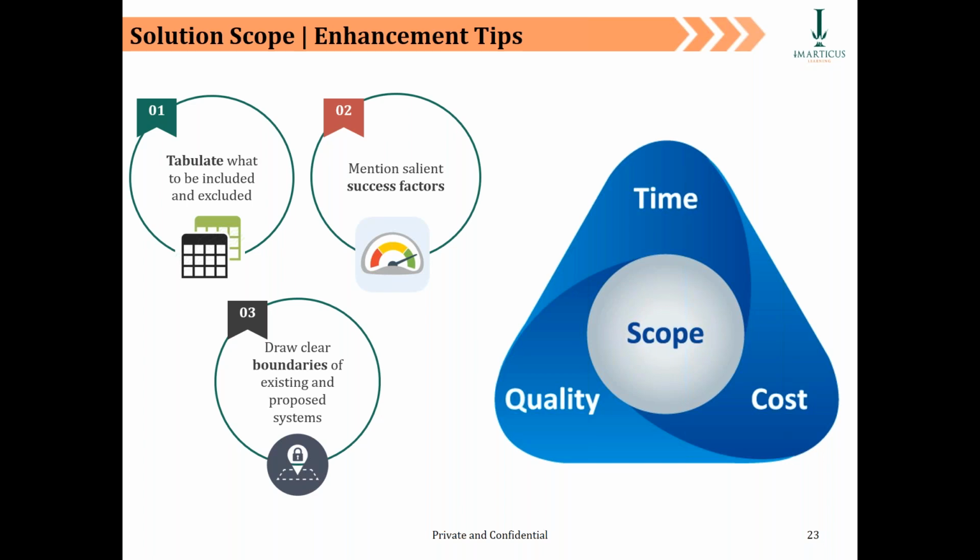Only three people do: X, Y, and Z. This means, guys, we will automate workflows for now, as a pilot, only for them. This means that at the workflow configuration definition, we will keep a condition or a business rule that all purchase orders which are more than 10 lakhs should go via workflow. All purchase orders which are less than 10 lakhs should go via the manual route. Okay, so